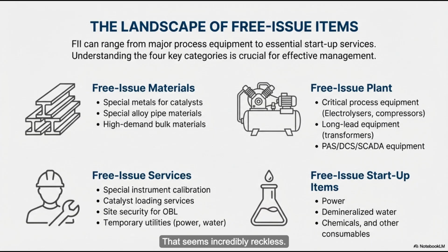That seems incredibly reckless. What if the project gets canceled? What if the board votes no? Then you have a very, very expensive problem. The source material is quite specific about this. It talks about cancellation fees. If you order a custom turbine and then call the manufacturer 6 months later to say, actually, never mind, they don't just say, no worries.